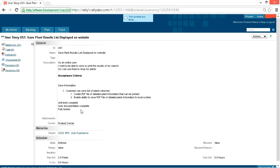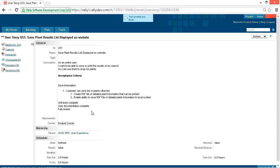This is good acceptance criteria. It's very focused, very easy to understand, easy to test. This user story, the team will be able to estimate it and complete it very quickly. Additionally, the task for the story will be complete early in the sprint, allowing QA to test it during the sprint while the larger user stories are being worked. And so QA can be utilized throughout the sprint, rather than having the backlog like you do in other processes, where everything gets thrown over to the QA team at the end and they really don't have time to test it all fully.